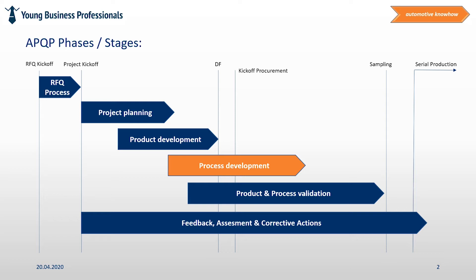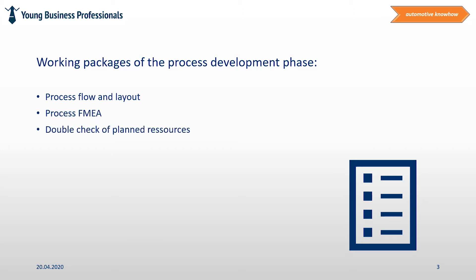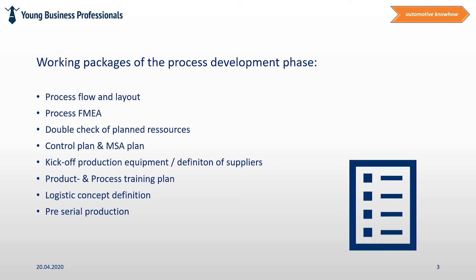Now let's take a more detailed look at all single working packages of APQP Phase 3. The following working packages are part of the process design phase: process flow and layout, process FMEA, double check of plant resources, control plan and MSA plan, kickoff of production equipment and definition of suppliers, product and process trainings to be planned, logistic concept definition, pre-serial production, and the quality gate phase 3.